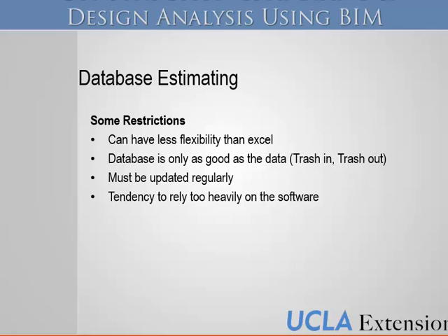The way they worded it, the owner or the stockholder gave the preliminary report, but the GC is responsible on the soil report and is considered to provide the permanent, final report. So that's what happened when they found out there's a brown area and they have to put in new soil, and it was actually a $4 million lawsuit.